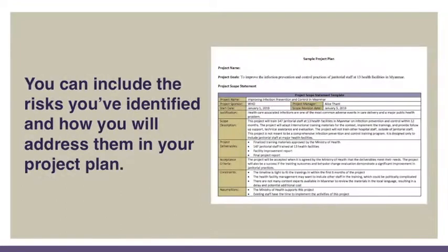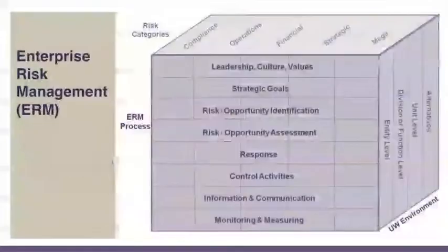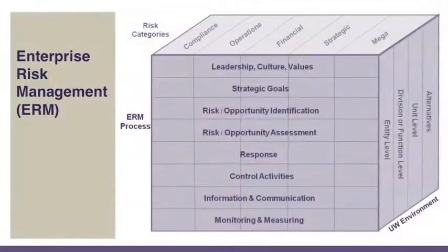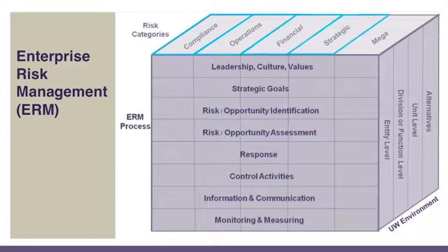In your project plan, you can include the risks you've identified, as well as how you will assess and respond to them. Another more complex framework that is commonly used in risk management is called enterprise risk management, or ERM. ERM assesses risk and opportunity in the context of strategic objectives and views risk holistically, not functionally. It uses categories of risk, including compliance, operations, financial, strategic, and mega.